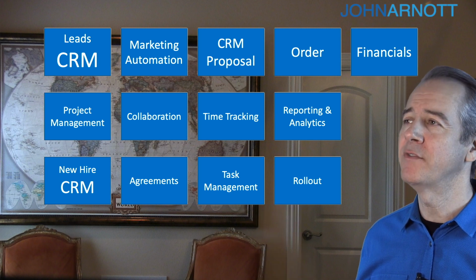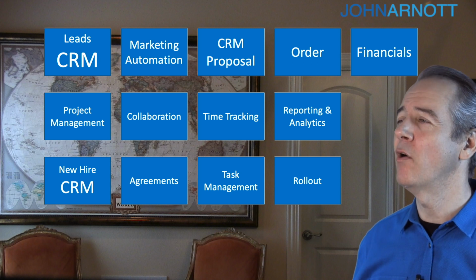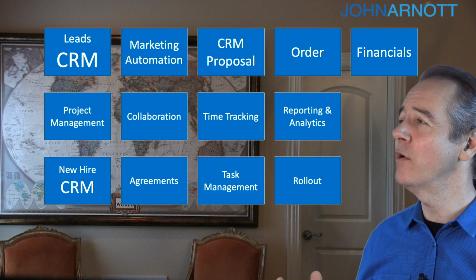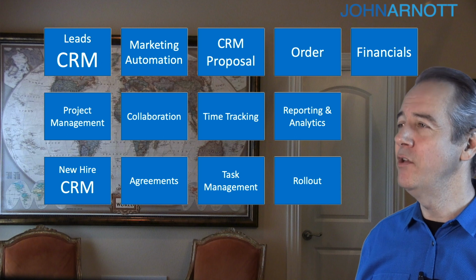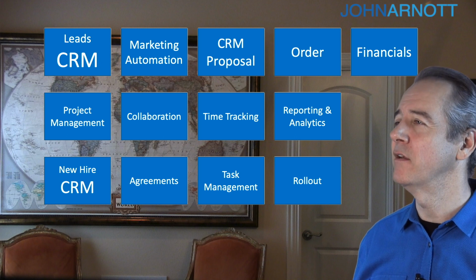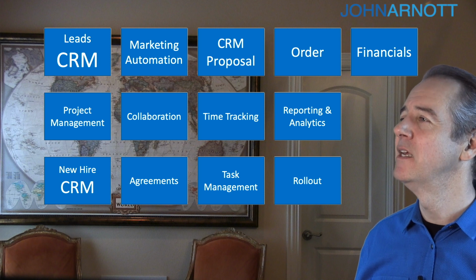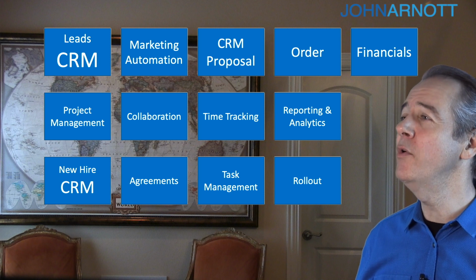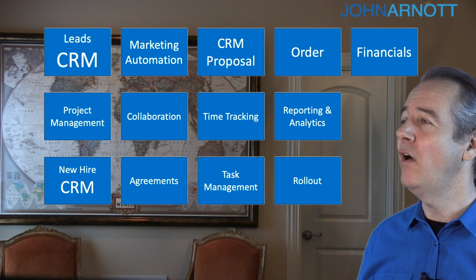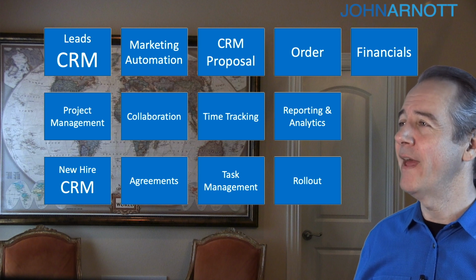Well, then that hands off to project management. When that order passes to financials, that order also creates a new project in Asana. So project management now has what they need to do and assigns a task to the operations manager to load in a template of all the tasks that need to be done for that type of project.